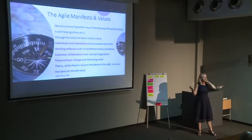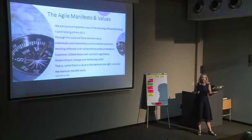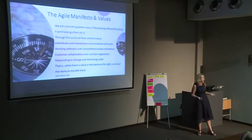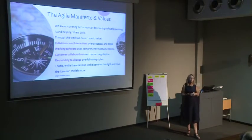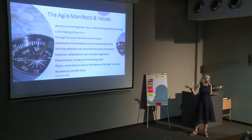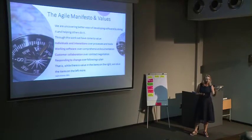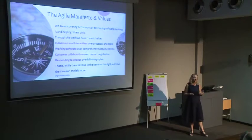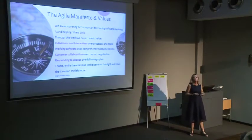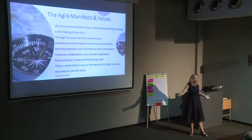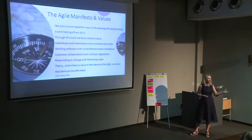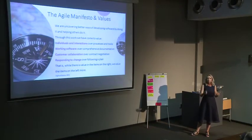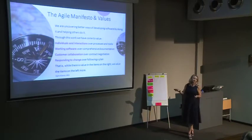Customer collaboration over contract negotiation — customers are part of your team. If they don't come to your stand-ups, you can't answer questions and the project gets delayed. I've worked on projects where it was new legislation, business owners didn't know what we had to do, they didn't show up for stand-ups, and we had to wait for email replies or escalate to EXCO. That project was just delayed and drawn out tremendously. Now I work on projects where customers attend stand-ups and demos, and the speed has increased amazingly because every morning if you have a question, you get the answer from the customer and today you have a solution.